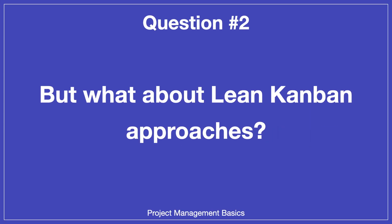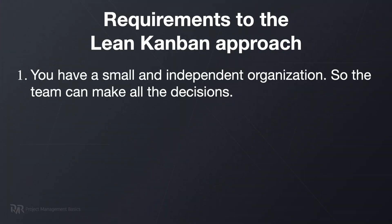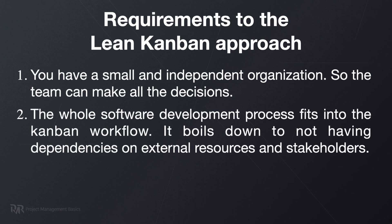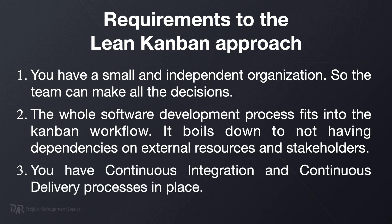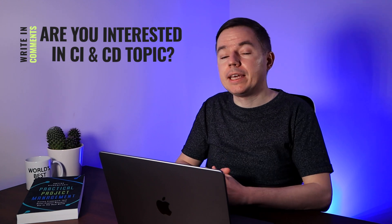What about Lean Kanban approaches that describe the development process end to end? It's more of an exception in the real world. However, this approach will work if you meet the following requirements: you have a small and independent organization where the team can make all the decisions; the whole software development process fits into the Kanban workflow with no dependencies on external resources and stakeholders; and you have continuous integration and continuous delivery infrastructure in place. But usually teams evolve and mature to that state — it's unlikely you can build this process from scratch on day one.